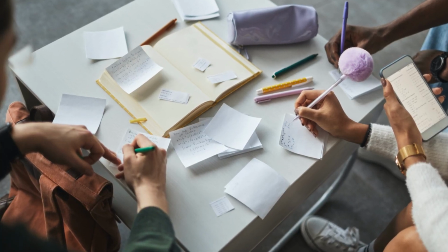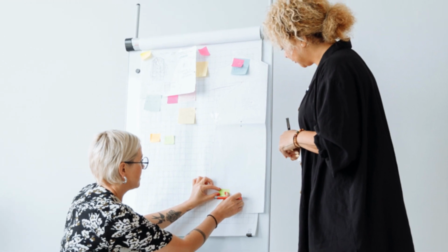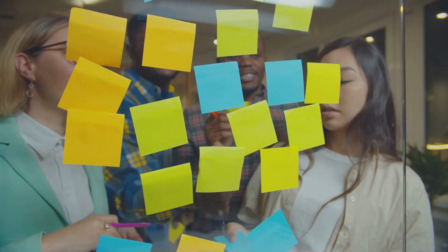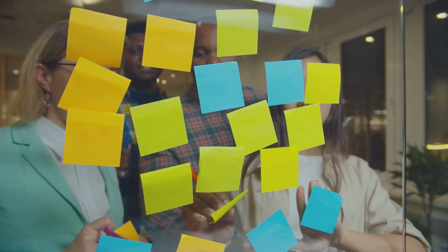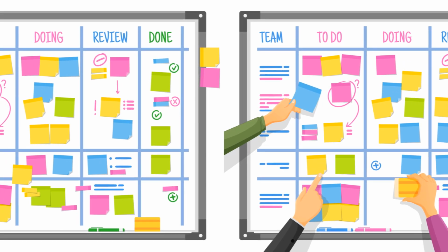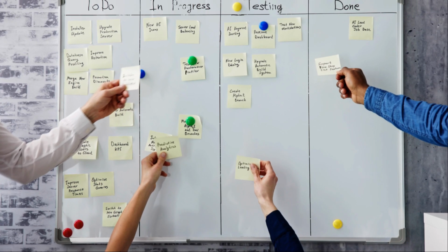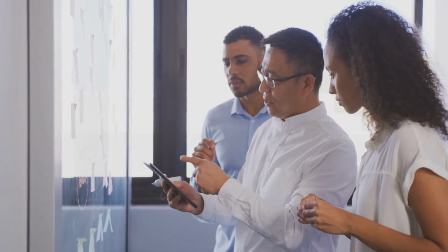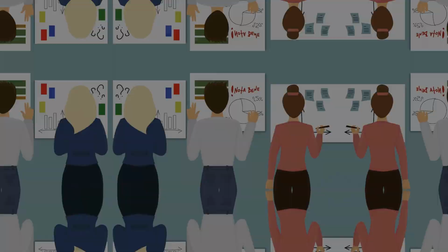In addition, the team should consider whether the story can be split into smaller sub-stories to make it easier to complete in the following sprint. If the story is too vague or difficult to complete, the team may rewrite it or break it down into parts that can deliver incremental value. It is also essential that only the incomplete tasks are carried over, not the entire story. This helps prevent confusion in future sprints and ensures the team maintains focus on the most important remaining work.